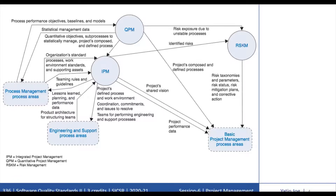The Integrated Project Management process area, IPM, establishes and maintains the project's defined process tailored from the organization's set of standard processes, which you can get from Organizational Process Definition, OPD. The project is managed using its defined process and uses and contributes to organizational process assets. The project's work environment is established from the organization's work environment standards, and teams are established using the organization's rules and guidelines. The project's relevant stakeholders coordinate their efforts through identification, negotiation, and tracking of critical dependencies and resolution of coordination issues.